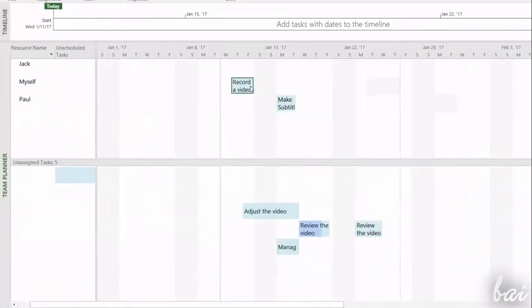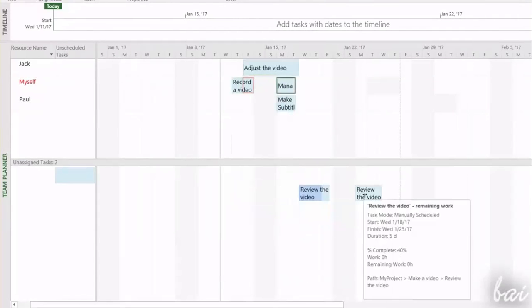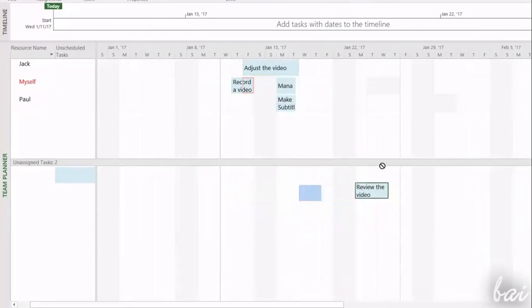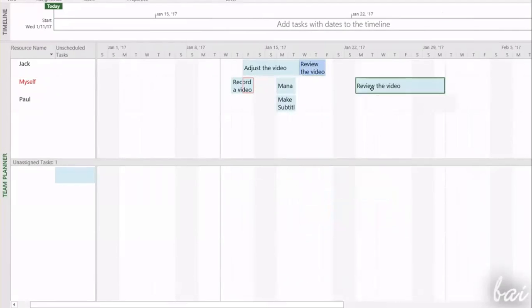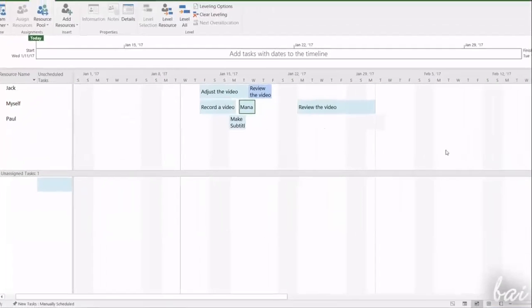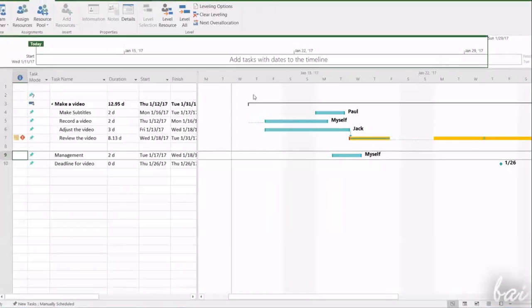Additionally, under Unassigned Tasks, you have all the tasks that must still be assigned to your team. You may drag and drop a task to the current resource row, matching the current time placement by observing the timeline above. In case you have a task split in several parts, you can assign it by moving the last part, and even assign different parts to different resources. When you come back to the Gantt chart workspace, you will see the resource names assigned to each task.